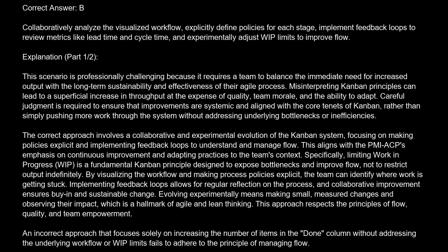Collaboratively analyze the visualized workflow, explicitly define policies for each stage, implement feedback loops to review metrics like lead time and cycle time, and experimentally adjust WIP limits to improve flow. Explanation. This scenario is professionally challenging because it requires a team to balance the immediate need for increased output with the long-term sustainability and effectiveness of their Agile process. Misinterpreting Kanban principles can lead to a superficial increase in throughput at the expense of quality, team morale, and the ability to adapt.